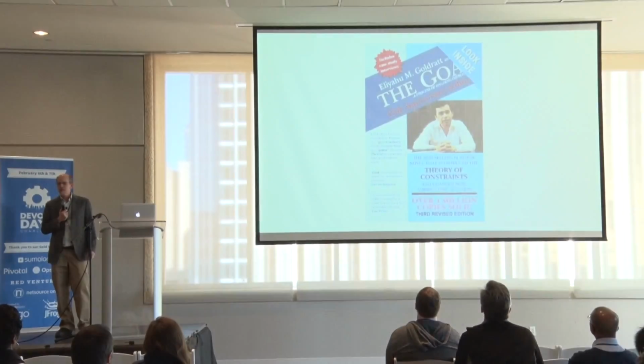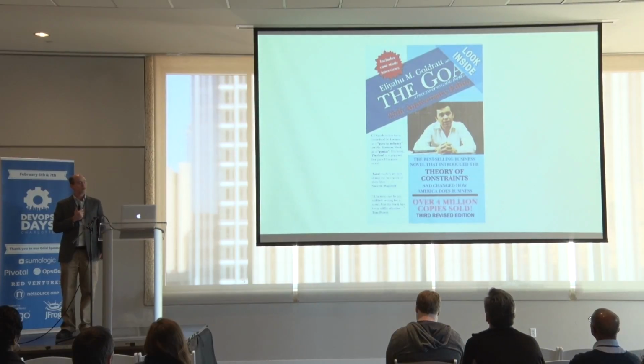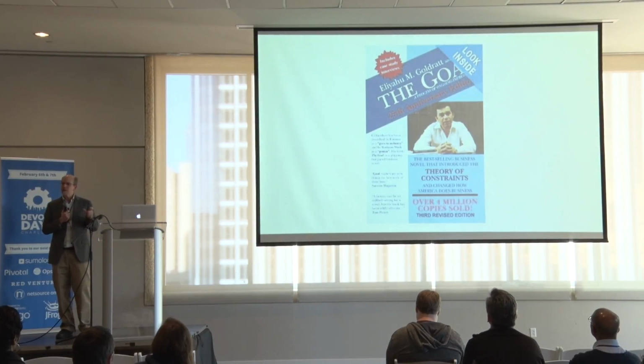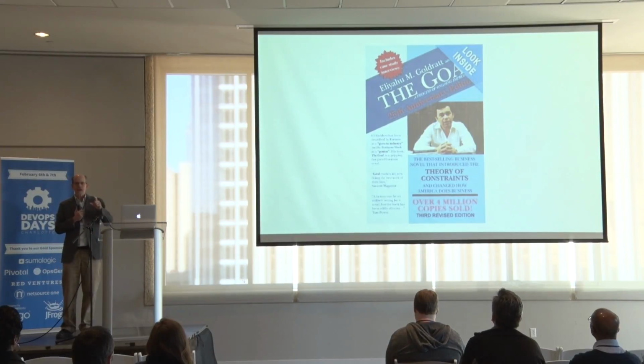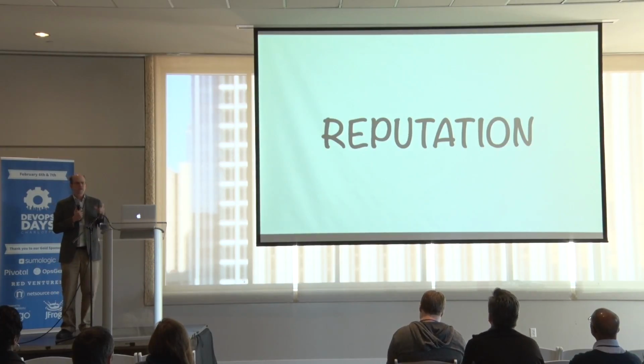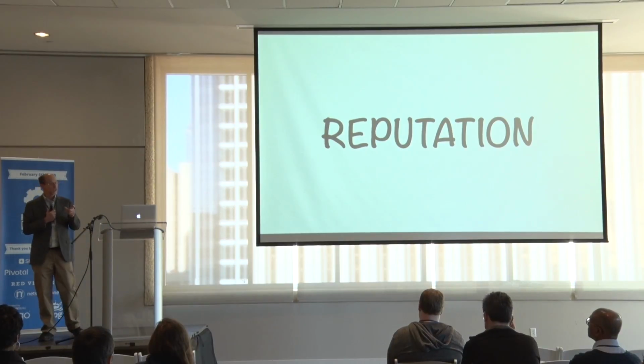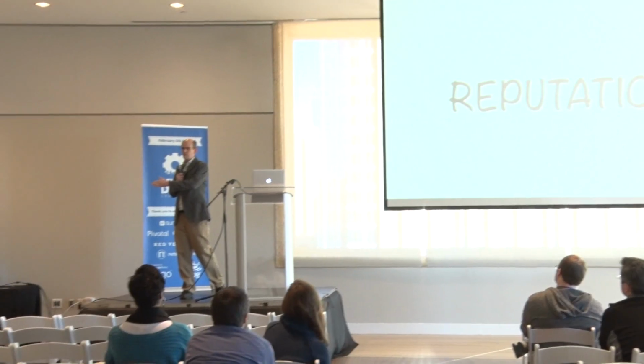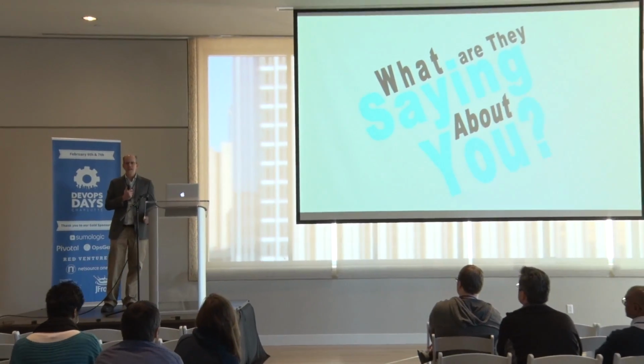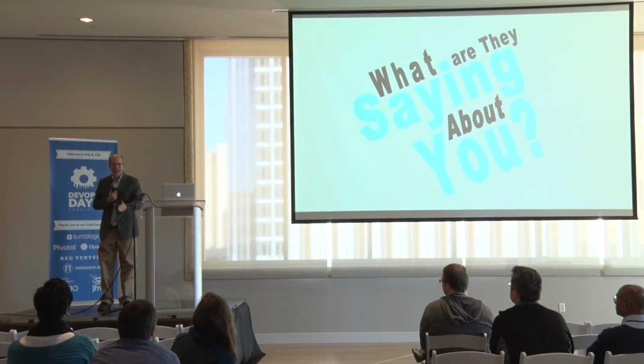Dr. Eli Goldratt wrote the book The Goal in 1984, which inspired a lot of DevOps. He also did a Beyond the Goal audiobook that followed that, and he talked about estimates, and how it's tied to reputation. If somebody has an estimate, for instance, of 2 weeks, and you deliver late, giving it 3 weeks, your reputation is affected. On the flip side, if you deliver early, your reputation is also affected because somebody says, well, you're putting in way too much of a buffer, so we can't believe anything that you say. And so unless you deliver exactly on the estimate, you're doomed.